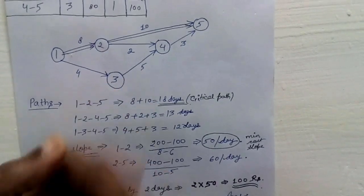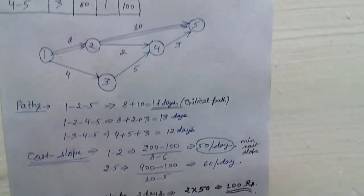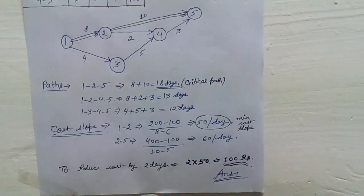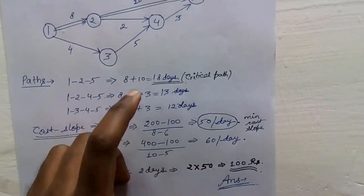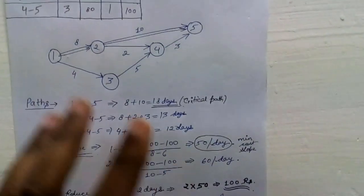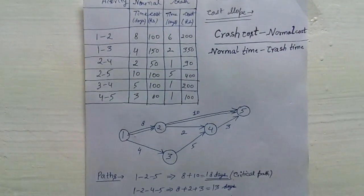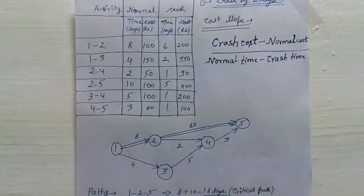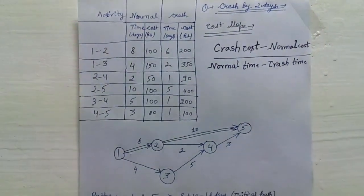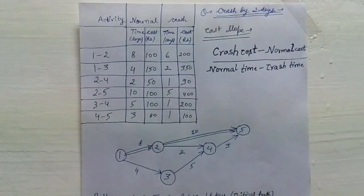So maximum you can complete the project in 16 days following this path, and the total additional cost for crashing is 100 rupees. If you found this video helpful, please like, comment, and share, and subscribe to my channel. In the next video I will be teaching more such questions. Till then, take care, bye bye, thank you.